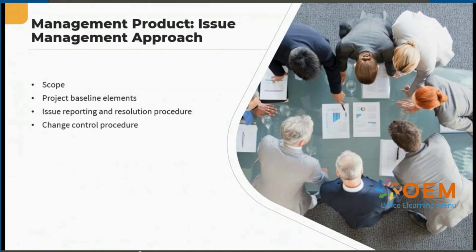The change control procedure may be slightly different, so we will describe how changes to the project baseline will be requested, decided, incorporated, and verified. And again, any variances from our business standards should be highlighted, together with a justification. We record the authorised change budget and any allocations at the stage or work package level. And the timing of formal issue management activities will be recorded. When and how often will our issues be reviewed and decided, for example?